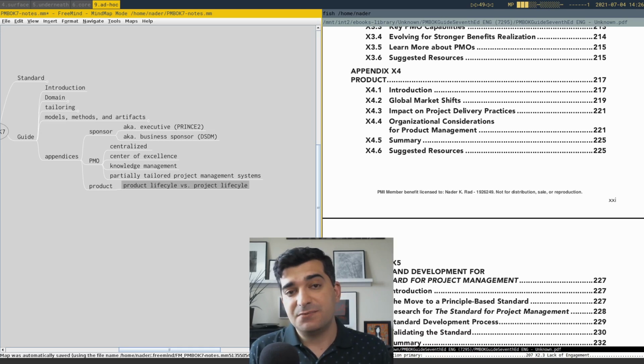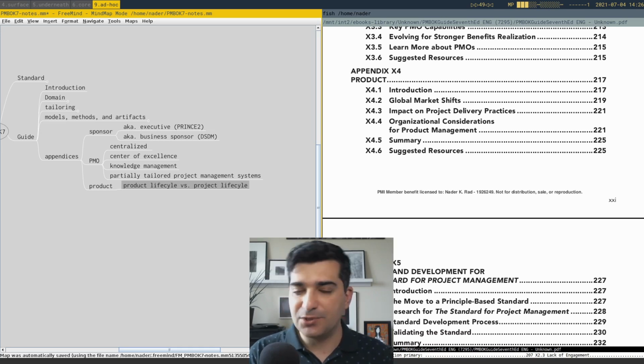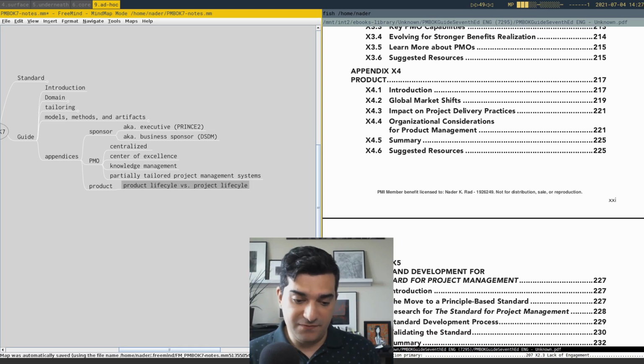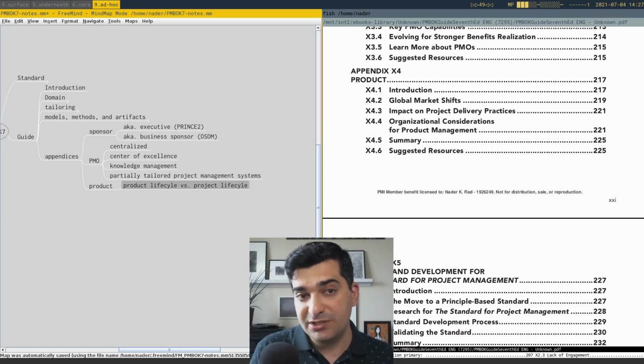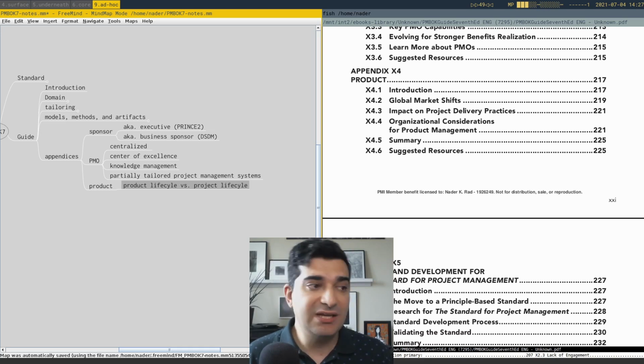In many cases, we need to consider this difference and also think about the product lifecycle when we want to make decisions inside the project. Sometimes we can have a project that is a little more expensive, but in return reduces the operation costs a lot. You may see that it's justifiable and then go for that.